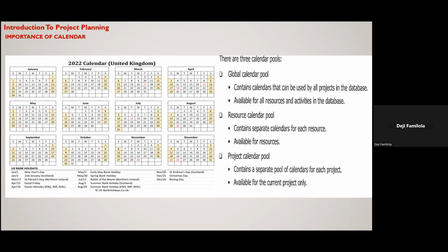You ask them, what calendar are you using? What is your working calendar? They say, oh, we only work Monday to Friday and we work from 8 to 6. So you need to set your calendar in the software to 8 to 6, Monday to Friday. You block out, which I will show you how this works, all the weekends.